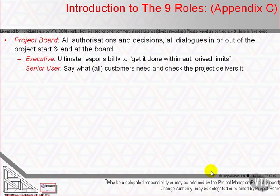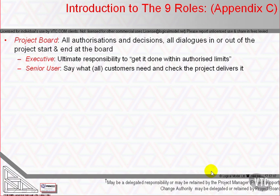The senior user, or perhaps senior users, is or are responsible for specifying the needs of those who will use the project's products, for liaison with the project management team, and for monitoring that the solution will meet the needs within the constraints of the business case in terms of quality, functionality and ease of use. The role represents the interests of all those who will use the project's products including operations and maintenance, those for whom the products will achieve an objective, or those who will use the products to deliver the benefits. The senior user role commits user resources and monitors the products against requirements. The role may require more than one person to cover all user interests but should not be split between too many people.